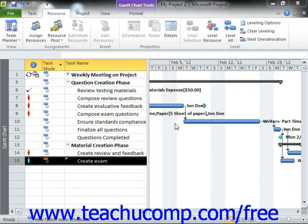As you complete the work on your project file, you should monitor your resource allocation. You may be under-using resources that you could otherwise utilize, which is called under-allocating resources. Perhaps more importantly, you may also accidentally be over-allocating resources, or trying to schedule more work to a resource than is possible in a given time period. In this lesson, we will examine how to monitor your resource allocation within your project file.